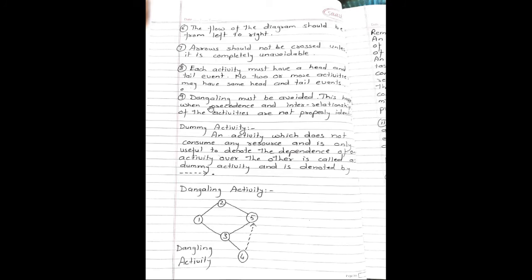Next rule: Each activity must have a head and tail event. Not two or more activities may have same head and tail events. Dangling must be avoided. This happens when precedence and interrelationship of an activity are not properly identified.